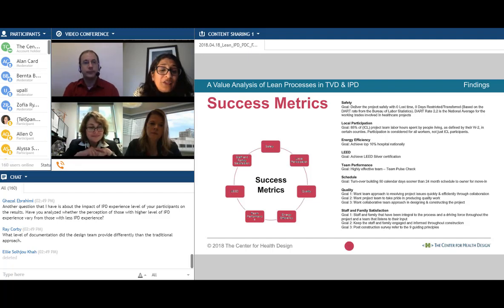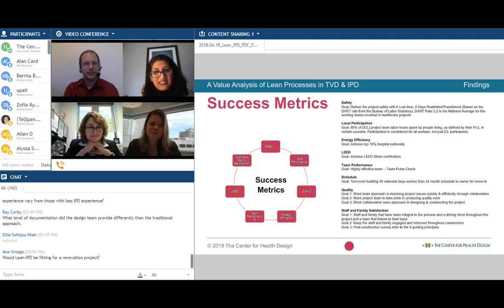And from node to node, Alan, as a research team, for us to have an innovation log that said these were the key decisions, that each decision is linked to a series of A3s, and you can go to the A3, and the A3 says this was the problem, this was the root cause, this is the research the team did, this is the decision we came to, this is how much money we thought we would save. That was golden. We could review those documents and say, oh, okay, there's a rationale for why this was done, and understand where we should focus.